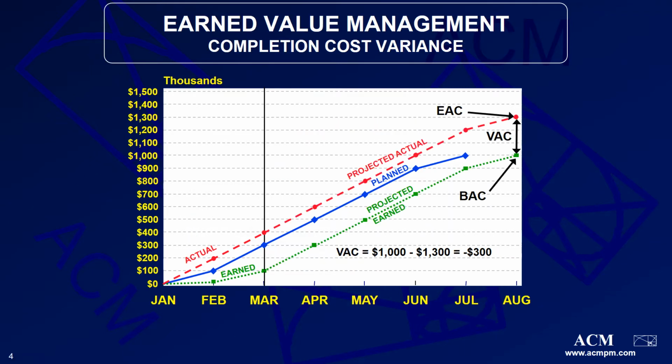Another earned value management tool that should be used when evaluating a project is the variance at completion. The variance at completion can be calculated by subtracting the estimate at completion from the budget at completion. When a variance at completion is greater than 0, this is favorable and shows an underrun within the project. When a variance at completion is less than 0, this is unfavorable and shows that a project is overrun. Analysis of this variance will allow early warning of potential future cost and schedule impacts.